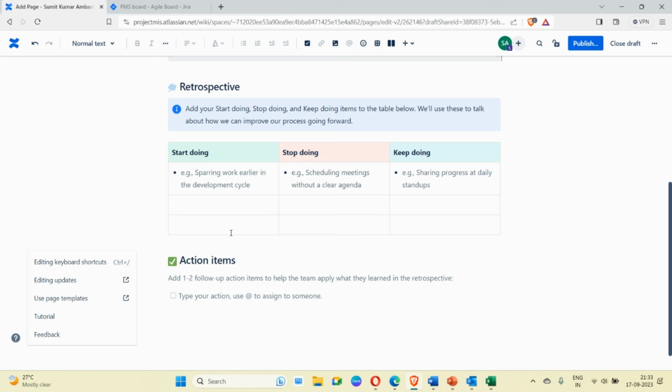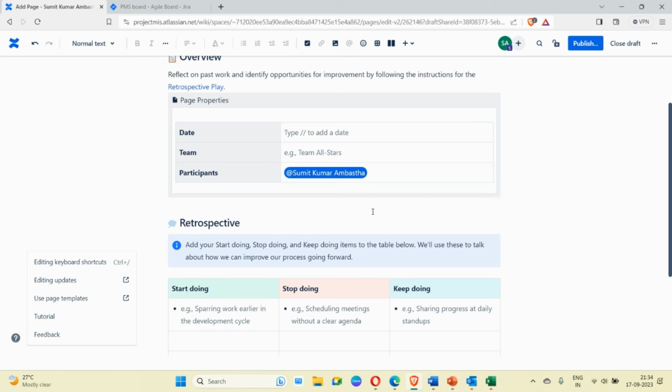In the next retrospective, before we discuss keep doing, stop doing, and start doing, we should first talk about the action points agreed in the previous retrospective, and whether they were implemented or not. If implemented, we'll see how it reflects during the discussion. And if it is not implemented, then we have to see what the issue and the blocker is. That's a general approach for any action point which is not implemented. In general, that is how the retrospective works.